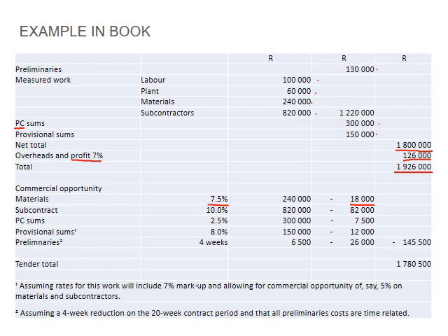My subcontractors, I can negotiate, for instance, that they take some of the risk for their work, insurances, etc., perhaps, or they need to buy the material, so you can squeeze them and get their cost lower to 82,000.